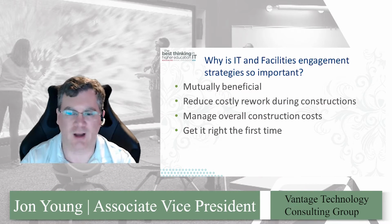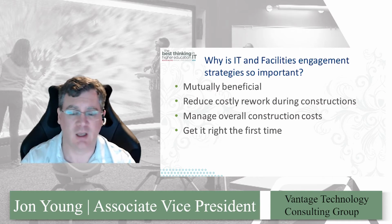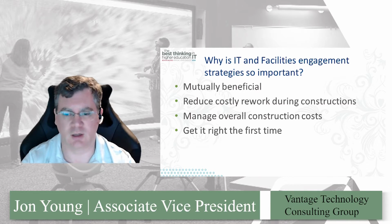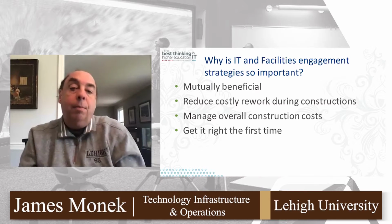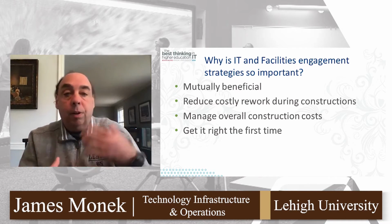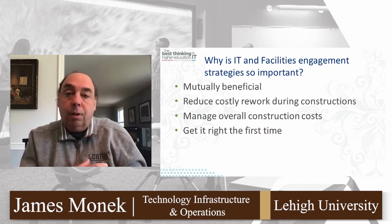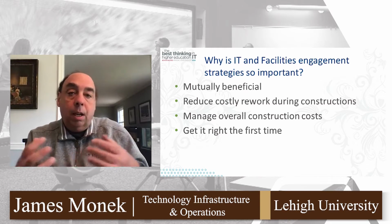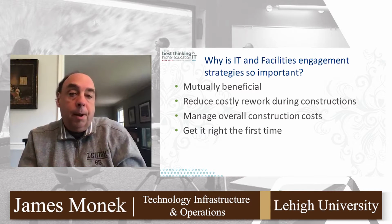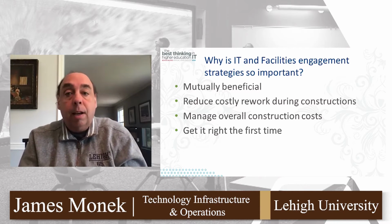Why is it important for IT and facilities to engage during construction projects, during the design phase, pre-design, and throughout the construction project? Jim, you want to kick that off? Yes, thank you. I think it's very important that IT gets engaged from the very beginning of any construction project, either new or renovation. IT can really provide the standards for networking, for communication, for classroom technologies, including locations of your closets, locations of access points, classroom layouts, where you want the podiums to be. Because once you have the building built, the walls built, it's very difficult to go back and retrofit anything later on, and also very costly to do so.